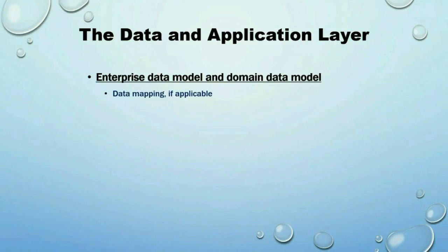This is not a surprise, because if you have a new application that's introduced and you don't have old data to convert, then you don't need a data mapping analysis. But this is extremely important because it not only tells you how to convert old data into new data, but also you may find there's a big gap between the old and the new data model. This was the case in the DSO case.